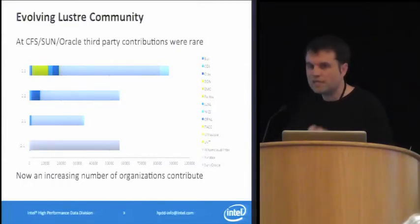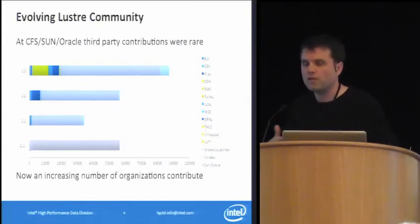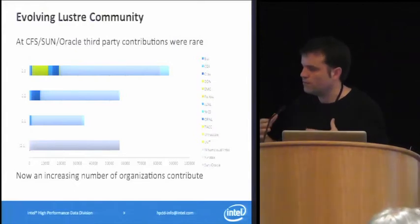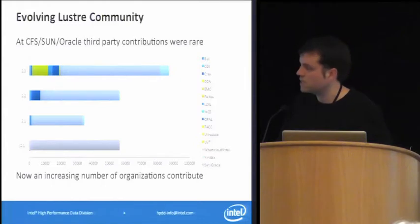Then I realized that the key factor was the amount of community testing. The work that was happening on 2.1 was really a continuation from the 2.0 release that had come out in July of that year. It was the same engineering team continuing to harden and bug fix the initial 2.0 baseline, obviously using similar testing and similar hardware for all their testing.